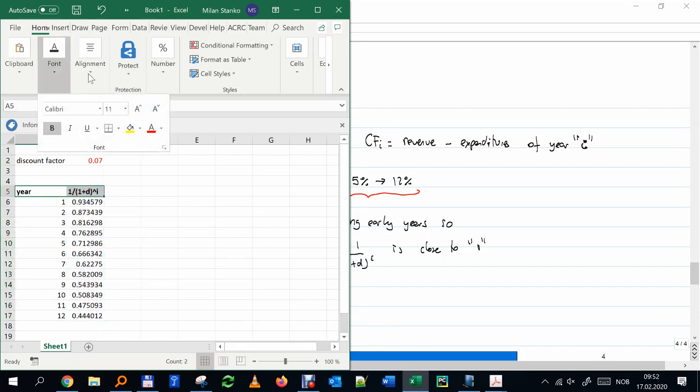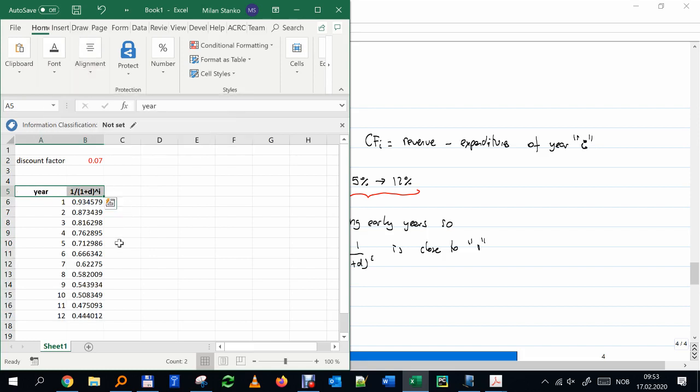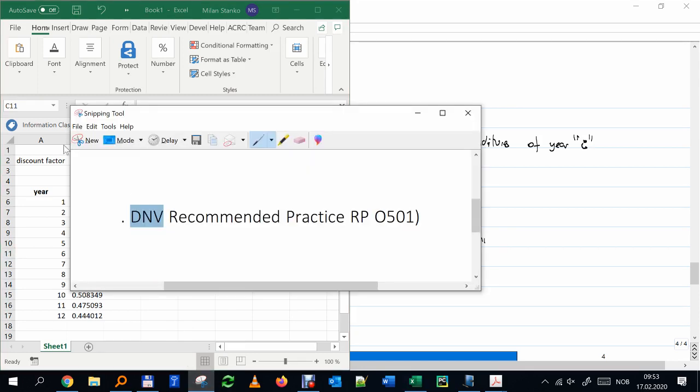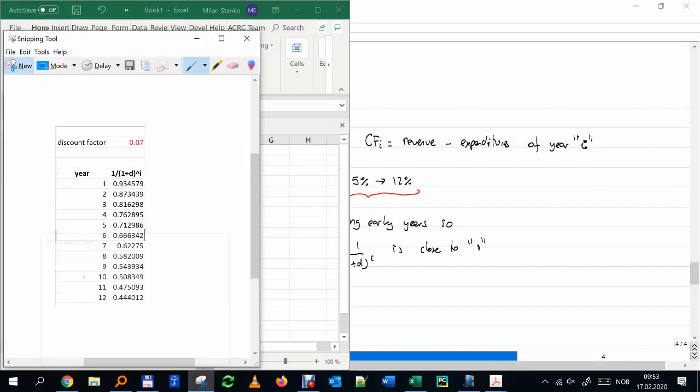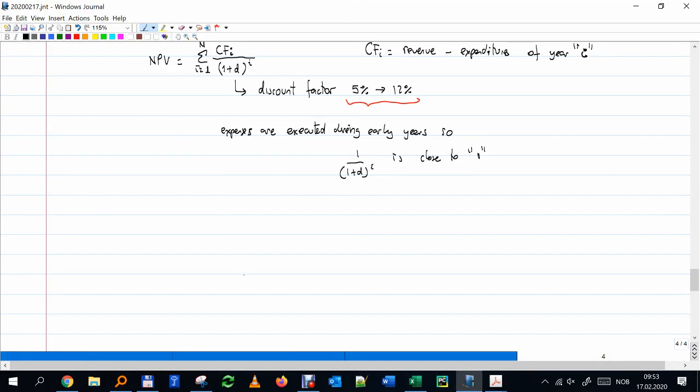So that's the expenses. That's why OPEX, let's say OPEX happens when I have already the start of production, very late. So the OPEX even might be a big number, still is discounted by those. So CAPEX, DRILLEX, they are usually much more important than everything else. But despite of that, we still make money. So it's amazing.